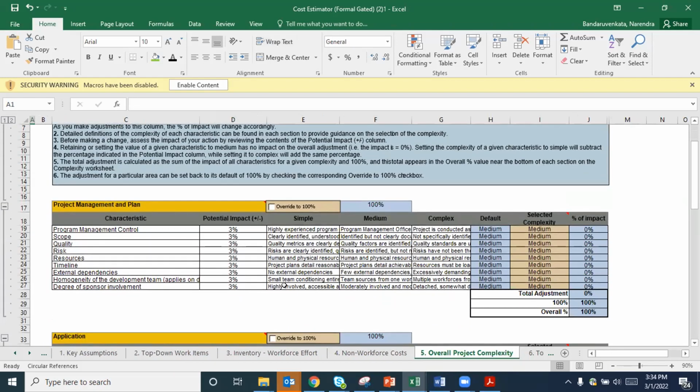So we want to understand component-wise complexity, component-wise risk, and then now we go to the project level complexity. So we want to understand, is it a BPU related, is it a NERC, or is it a cybersecurity related project that thereby there is a heavy complexity involved in it, or is it related to some sort of a complex environment like OMS, outage management system, or GIS, or anything that is going to be extremely complex to handle with.